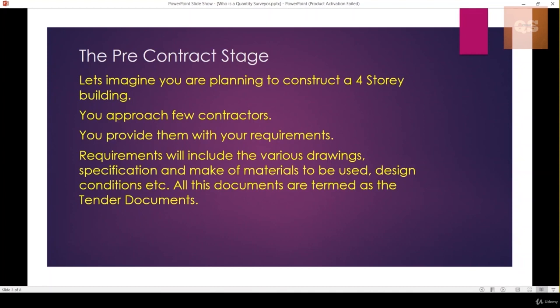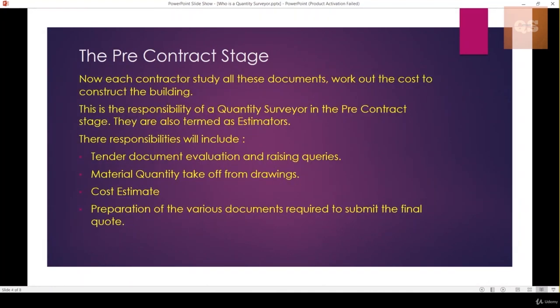Once these documents are prepared, they are given to all the contractors who are going to compete to build the project — and that's when your pre-contract stage starts. Once the contractor receives all the tender documents, all the specifications, drawings, and design conditions, the responsibility of a Quantity Surveyor in the pre-contract stage begins. This includes evaluation of the tender documents and raising queries if there are any missing documents or errors.